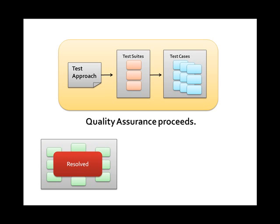Once the requirement has been resolved, the Notion quality assurance process can proceed. The Notion quality assurance process will identify a test approach, test suites or test plans, and then individual test cases that will validate whether or not the requirement meets the customer specification.